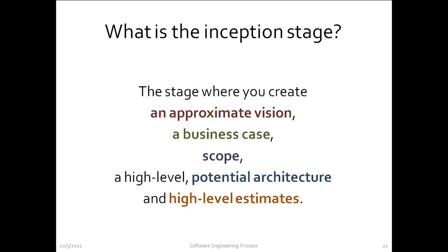The inception stage is the stage where you create an approximate vision, a business case, a high-level scope, and a high-level potential architecture and high-level estimates. This is the stage where things are being figured out: vision, business case, scope, potential architecture, and high-level estimates of effort and cost.